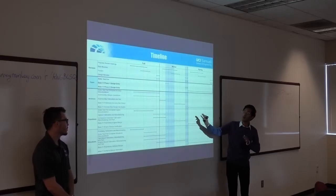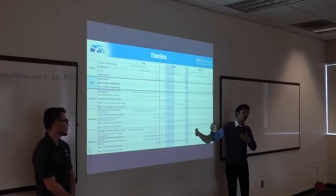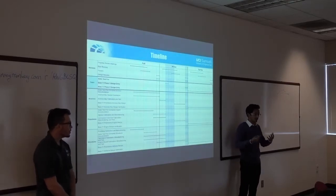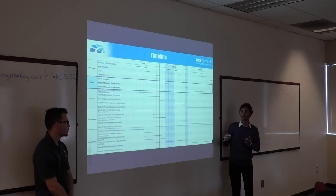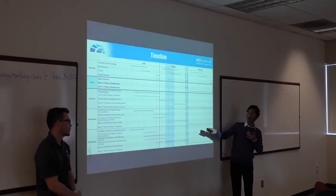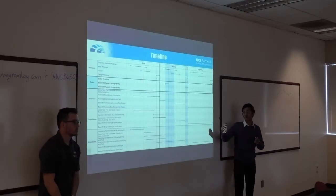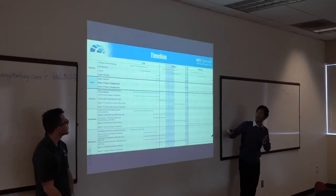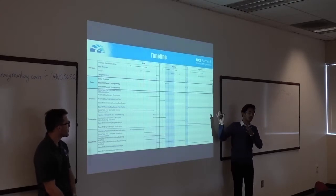It's important for us to conduct the static test fire before our phase one design, because it gives us non-theoretical results. We can actually see what failed and what worked, and use that to adjust our design. We also have the feedback from the interim report to use for the phase one design. And then moving forward from there, we focus on phase two.